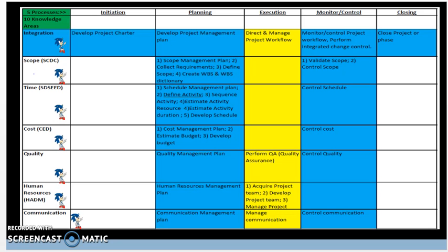We are now in the third part of planning, which is for cost. This explains how much money is going to be allotted and budgeted to deliver the product, service, or result as part of the project. Here we are planning how you are going to manage the cost of the project, which feeds into, as an input, all other subsidiary processes except control cost. This gives the cost management plan. And a cost management plan details the processes that establish policies and procedures for documentation of planning, managing, expending, and controlling project costs.